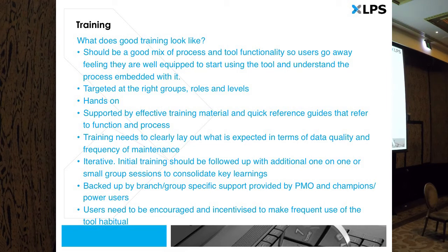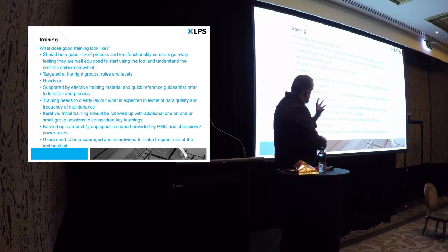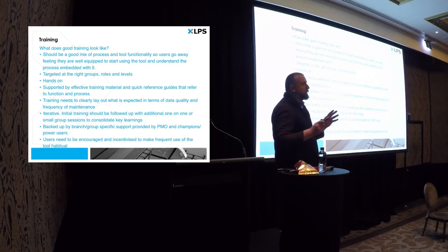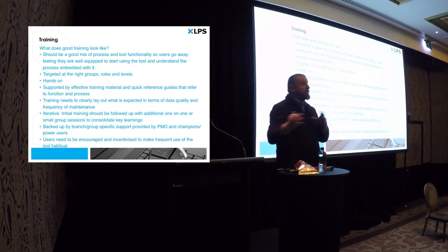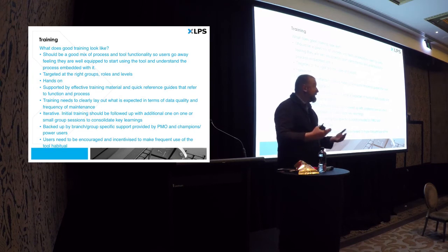Backing up. So post-training support. We often try, in our organisation, to provide multiple sessions of training, not day-long sessions that people leave wondering, what the hell have I just found out about, and remember about 10% of it. We provide short, sharp sessions initially. We then try to ensure we have follow-up sessions where we can take those people, perhaps in a one-on-one or one-on-two, through how to use the system in their own way and in ways that relate to them in terms of their projects. And having that backup, whether it's provided by the implementer, by change champions or champions within the PMO or trainers, doesn't matter who it is, it's a really vital support part of any kind of engagement.